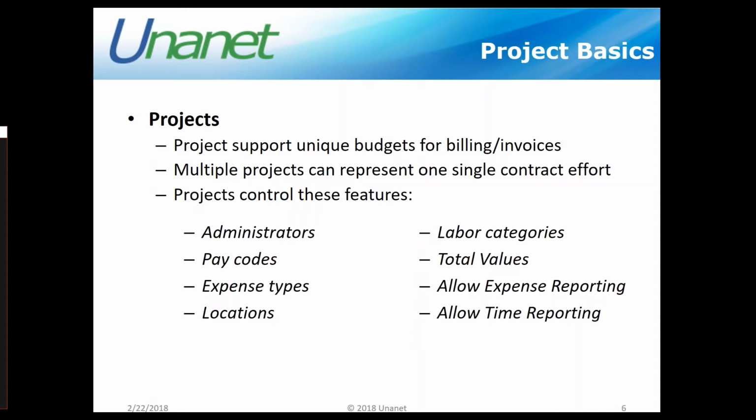I do want to share with you that when you're considering, do I do multiple tasks or do I do multiple projects, there are some configuration items that are specific to the project level. So this includes our administrators. So when we set up administrators under our project, every task that we assign to that project would have the same administrators. So if you had a particular effort where you wanted two different maybe project approvers or project leads in order to work on that particular effort, and you didn't want them to share information, you may want to set that effort up into two projects versus two tasks.